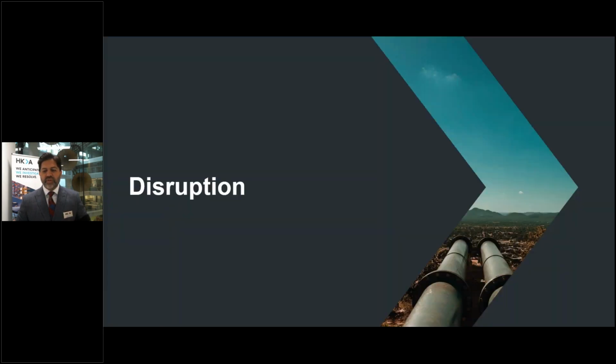I just want to talk about the Society of Construction Law's view, or their advice in this regard, that disruption claims relate to loss of productivity in the execution of particular work activities, and that because of disruption, these work activities are not able to be carried out as efficiently as reasonably planned or possible. You plan something, it doesn't happen, you move on, but you need to quantify it and recover it.